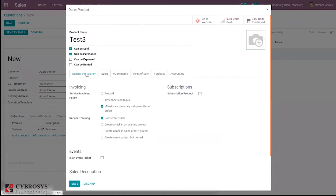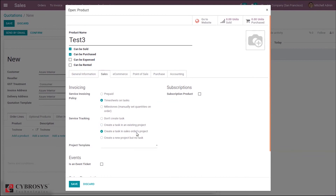There are three service invoicing policy options: prepaid on order quantity, timesheet on task — where invoicing is based on employee time spent — and milestone with manually set quantities on order, where part of the task can be invoiced immediately and the rest later. For service tracking, you can create a task without a project, in an existing project, in the sale order's project, or create a new project but no task. Here we select 'create a task in sale order's project,' so a new project is created with the sale order's name.